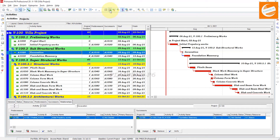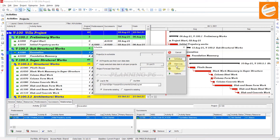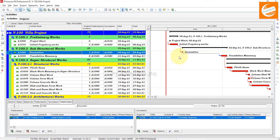After changing the relationship type, you have to schedule your project on the same date to see the behavior of your relationship. Now you can see the lag has been added.